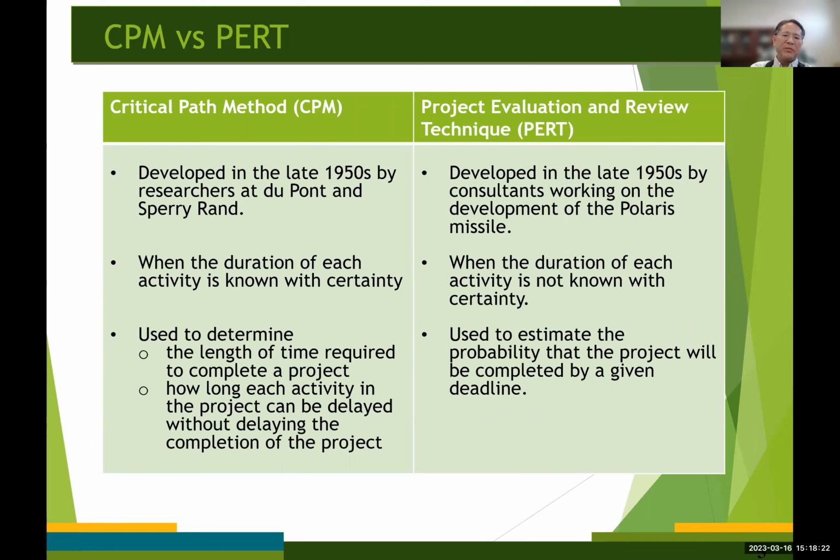So in a military research environment, the duration of each activity was very difficult to estimate, right? So the PERT emphasizes estimating the probability that the project will be completed by a certain given deadline. Okay.